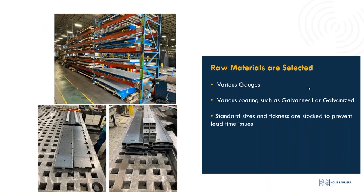For raw materials, we primarily use 12-gauge steel for windows. Blast-resistant windows may require additional blast material ordered separately. We typically use galvannealed material as our common window material; if moisture or water exposure is a factor, we use galvanized material to prevent rust on the window frame. Standard sizes and thicknesses are stocked to prevent lead time issues. For windows under eight feet, we keep material in-house to accommodate two, three, four, six, and eight-foot windows.